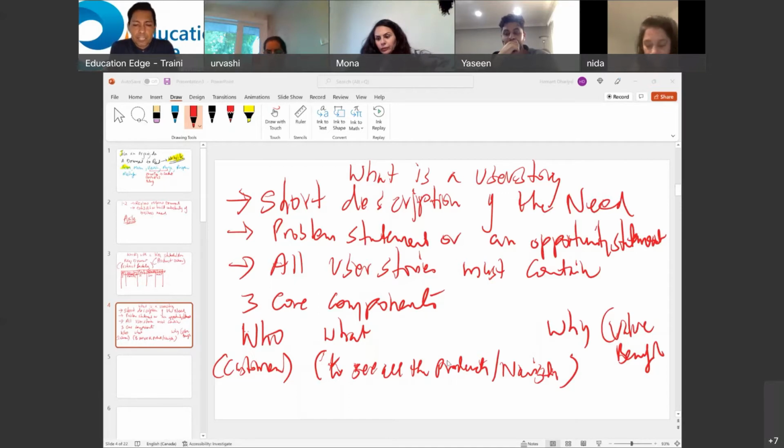So now someone says, well, define a user story for me. I say, well, a user story is a short description of the need, and need could be a problem statement or an opportunity statement. A user story usually would contain three core components: who, the actor or person who's going to use it; what, the description, how are they going to use it; and why, what is the benefit?